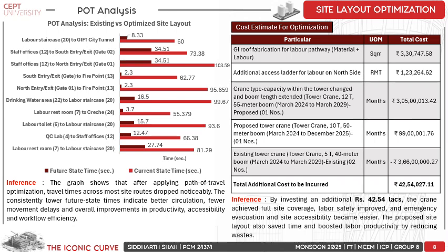So we have considered the monthly tariff for that, and the period for which this crane will be used, and the earlier cranes which had the 40-meter boom length, which was provided in the existing layout, that monthly tariff was subtracted.